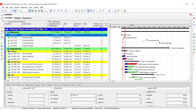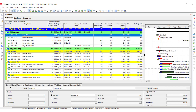The bottom baseline bars are showing and you are behind the schedule. This is the way to compare the actual progress with the planned progress — either in the activity table or in the Gantt chart. The progress line is showing that you are behind the schedule. The blue line is the data date on which we have updated the schedule.